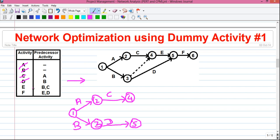Next, activity E. It has two predecessor activities, activity B and activity C. That means E cannot start until the activity B and activity C both are completed. So activity C is completed at event 4 and activity B is completed at event 3. So we have to join them with a dummy activity. And dummy activities are represented by dotted arrows. And dummy activity does not consume any resource or any time. So we have joined the activity B and activity C at the event 4. So we can start drawing activity E. End of activity E is represented by let's say 6. So activity E is done.